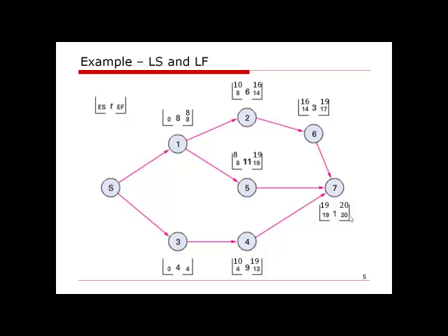Now, activity 1 goes to both of these 2 activities, which means its finish time needs to satisfy the starting time requirement of both activity 2 and activity 5.